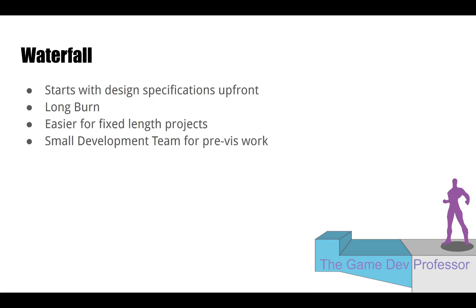Waterfall is a lot easier if you start knowing exactly what you want to make right at the beginning. If your company is saying 'we don't really know how fun this new mechanic is going to be,' that's more iterative. With waterfall you generally don't change too much, or if you do you have to go through the whole process again. It's better for fixed-length projects and usually means a small development team at the beginning for pre-visual work, then a very large team during production — so there's a staffing process through each of those stages as well.